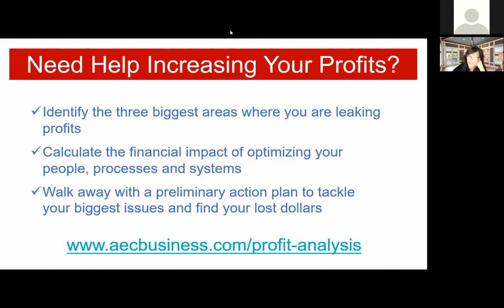So there's one question, and there are some really long ones here. What is a typical utilization rate for an interior design firm of about 25 people? Honestly, I don't know that. I would recommend going out to Y Group or one of those companies that has a financial performance survey and getting that information. I know in the industry it averages around 60 to 65%. But I still think that doesn't mean that you can't get much higher.